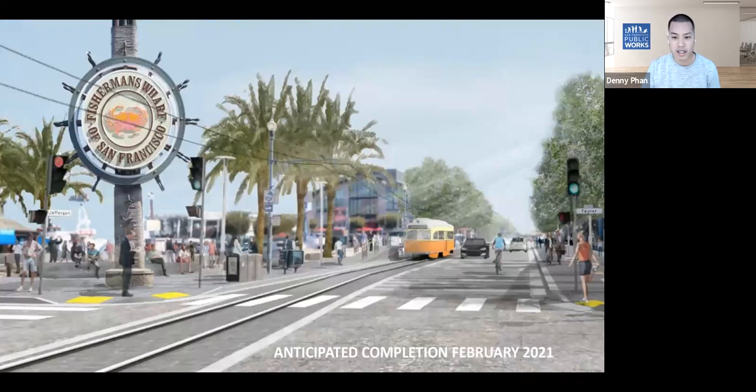Thanks, Ben. And thank you to all of our presenters who provided their unique perspectives on this project. It's been a really long road for this project. We started planning for phase 2 around 2017 and completed detailed design in early 2019. And then finally started construction in October 2019. And over the past year, we made tremendous construction progress, and we're very close to the end. We anticipate wrapping up construction soon here, just in early February, and we'll have a ribbon cutting event shortly afterwards. So look out for more information on that event and join us as we celebrate.